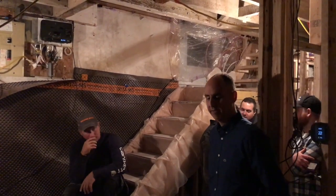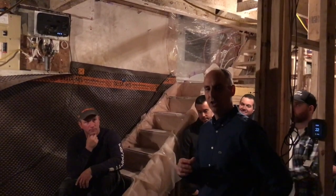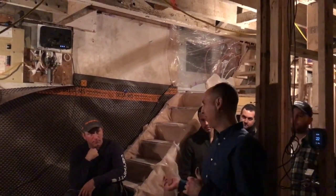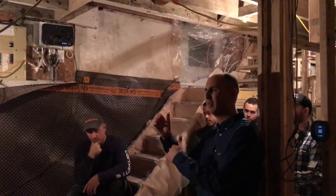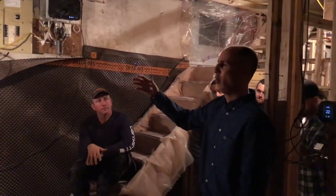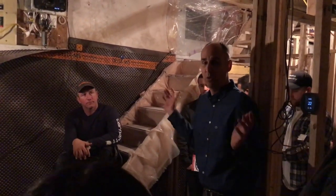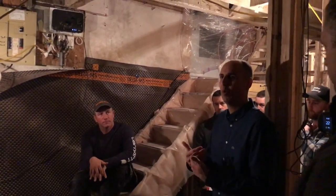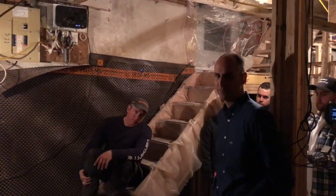Another common mistake I find is people decide to renovate and not do a gut renovation. So that whole creation zone I was telling you about, you even have good experience with this. You say, you know what, I'm just gonna do a cosmetic renovation. You start peeling back the wall, like in the kitchen, and you're like, oh shoot, now I just realized that there's asbestos in this drywall, or it's lath and plaster. You gotta keep peeling back, and before you know it, you're gutting the whole thing anyway. Their intention was not to, but they were hoping just to do a cosmetic renovation, and then end up realizing that they have to gut it anyway.